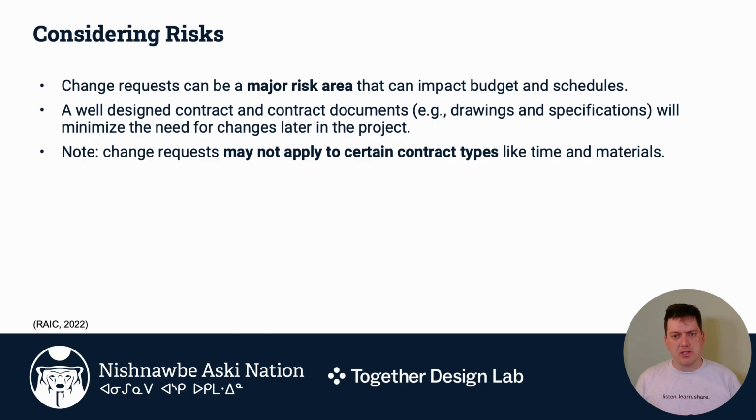What we want to say also is that one of the biggest risks that can arise here is if changes aren't processed quickly enough, or if folks on the ground aren't working together and being flexible for the needs of the project, what can happen is that changes get delayed and actually grow in scale or in scope, having more significant impact on the project.